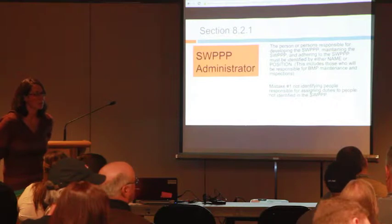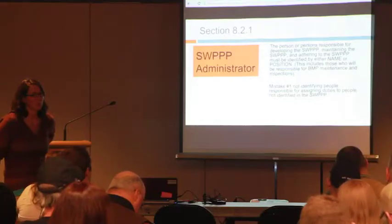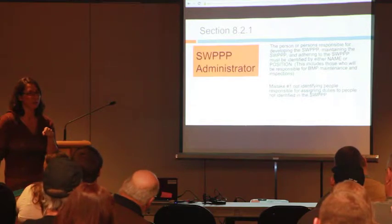The only time you need to submit to the state is if you're delegating someone to sign the inspection reports for the permittee. If you're just saying that Joe who worked for ABC, who was the SWIP administrator going around doing the inspections, is now going to be this other company, that doesn't matter. Make the change in the SWIP, but that does not have to be submitted to the state. The only other time you have to submit it to the state is if you're changing the permittee, usually the president of the company or something like that. If that changes, then that needs to be submitted to the state because that's got to go in our database.